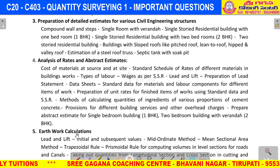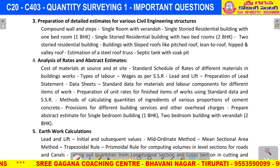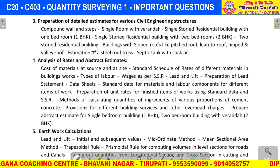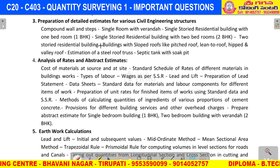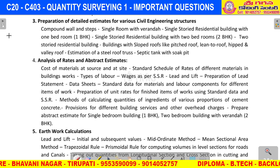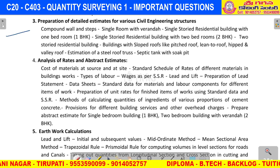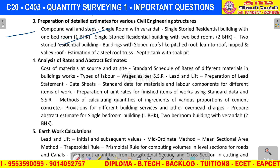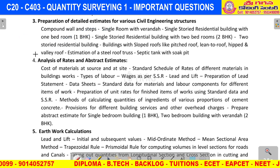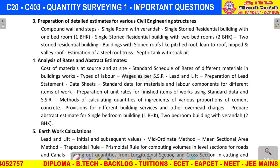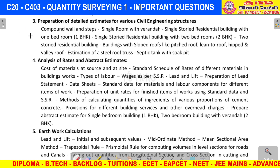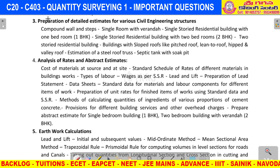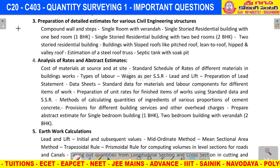The third unit is very very important — Detailed Estimate. For this, you need a building plan and required sections. From the plan and sections, we identify different items of work such as: earthwork excavation, CC bed, plinth, walls, and floor.